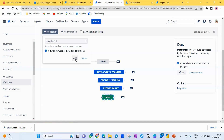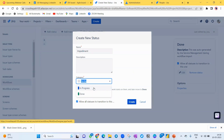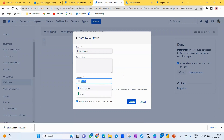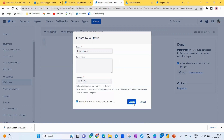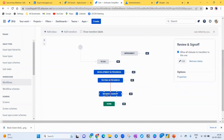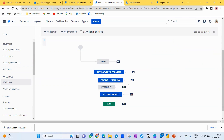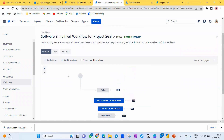For the Impediment column, make sure it's categorized as 'To Do', not 'In Progress' or 'Done', because impediment means the work has stopped — people are blocked and can't do anything. So it goes to the To Do category. Select 'All Stages', add it, and position it after Testing In Progress. This is the complete workflow I want for my team.